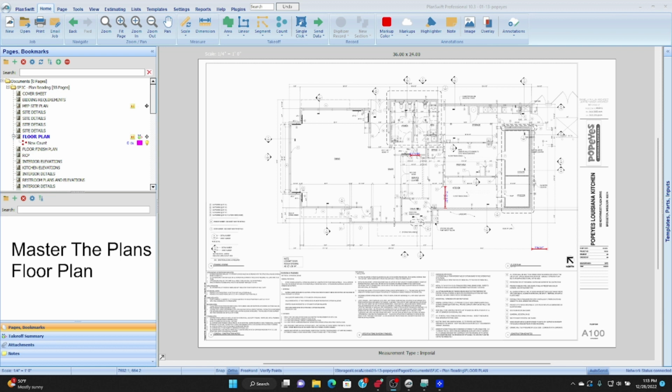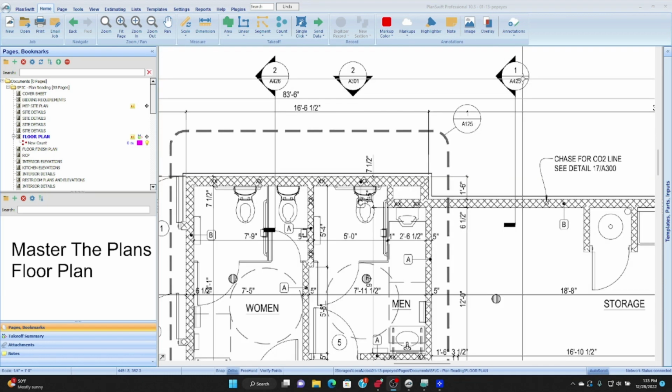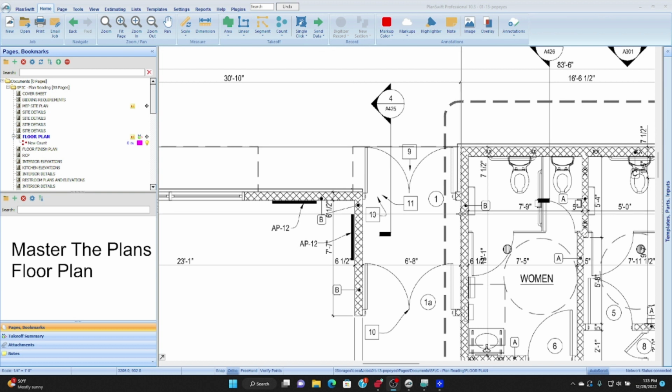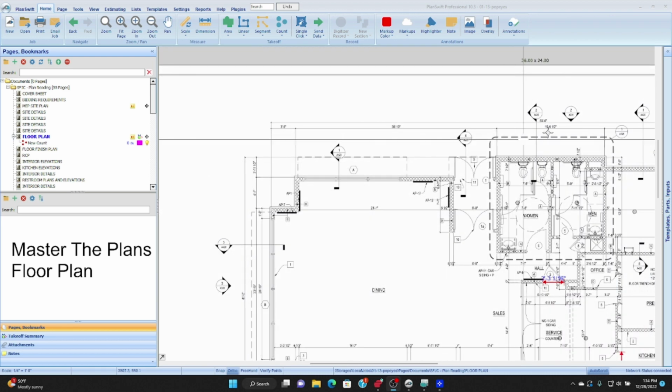And that's going to help our framing contractor be very detailed on the wall types because, ideally in most cases, at the section view, we're going to see wall construction that may or may not have insulation at one point. It may have plywood at one point. There, of course, is a section of wall that will be at the door, and so we need to be able to determine the height from above the door to the ceiling. And so the section views are very important.